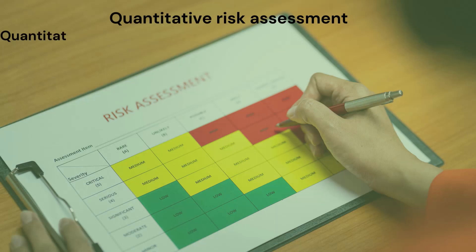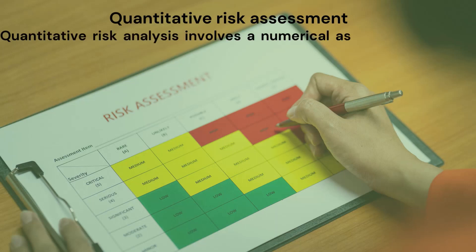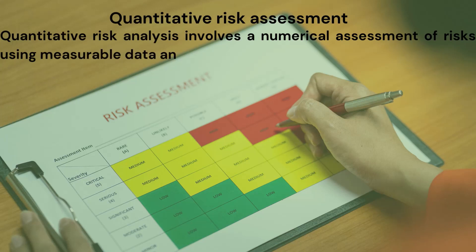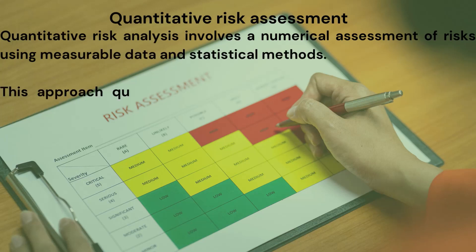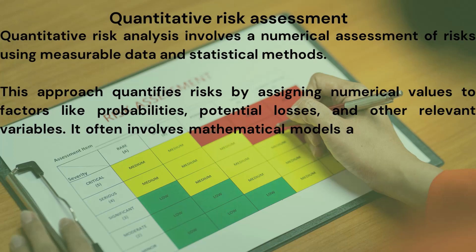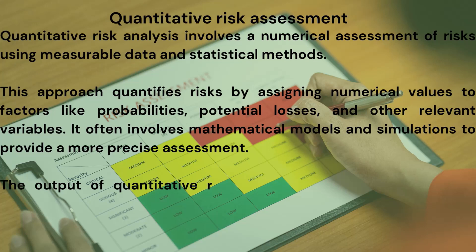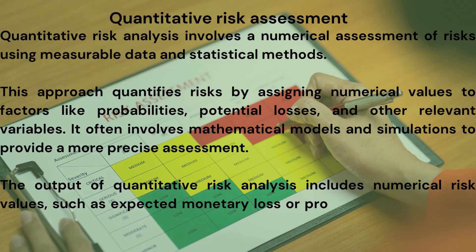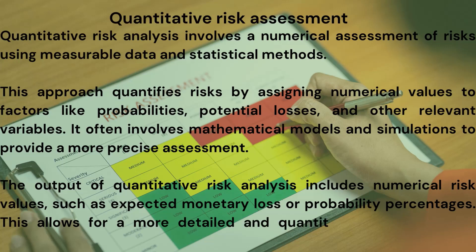Quantitative risk analysis involves a numerical assessment of risks using measurable data and statistical methods. This approach quantifies risks by assigning numerical values to factors like probabilities, potential losses, and other relevant variables, often using mathematical models and simulations. The output includes numerical risk values such as expected monetary loss or probability percentages, allowing for a more detailed comparison of different risks and aiding in decision-making.